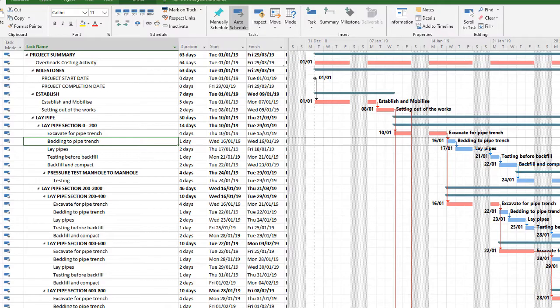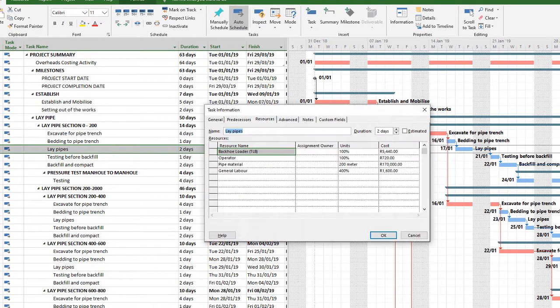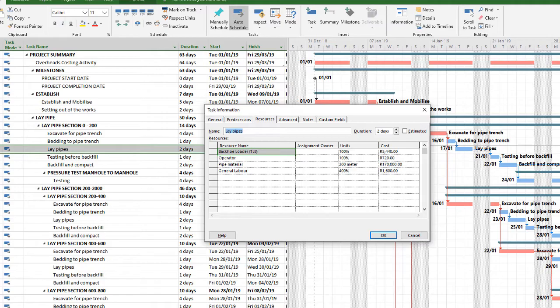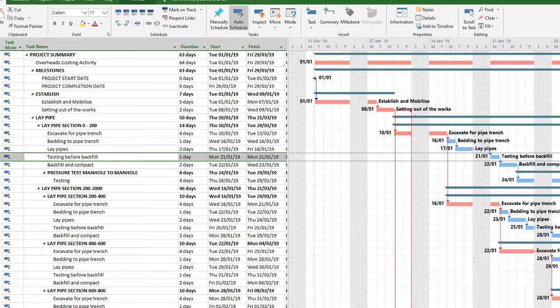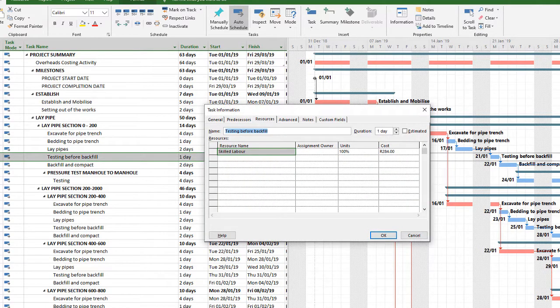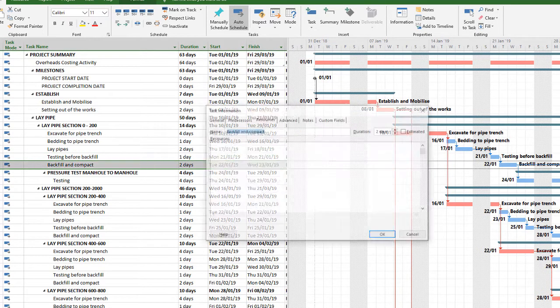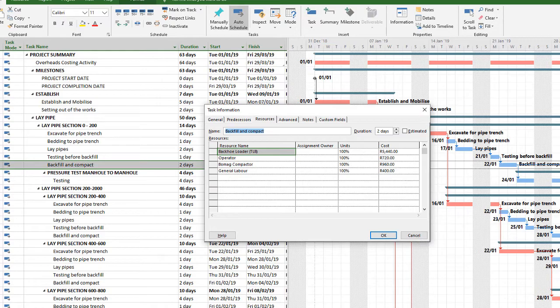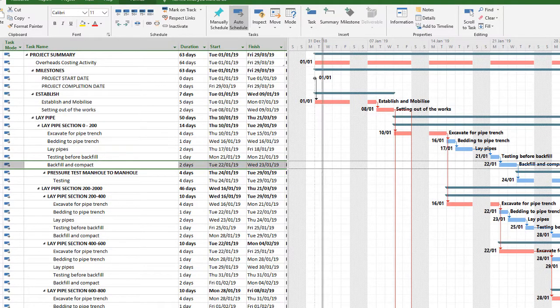The same with bedding or laying of the pipes. You'll see I use the TLB, I've got one operator, I've got 200 meters of pipe material costing me 170,000. And then I've got four laborers to assist. Very simple. Testing and backfill, I've just got a skilled laborer there. Backfill and compact, again, the TLB, a compactor, an operator and some labor.